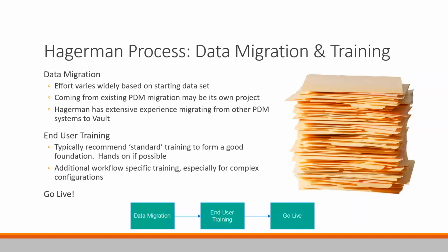It usually takes someone with the knowledge of your product, the knowledge of your existing file management system and how you've organized things. It's much more efficient for someone with knowledge of the system to clean up the data. So generally the way we handle data migration is we help you come up with a procedure and then you execute that procedure. If you want us to execute the procedure, we'll do it, but it's generally not cost effective to do so. Now, coming from an existing PDM system is a different story.